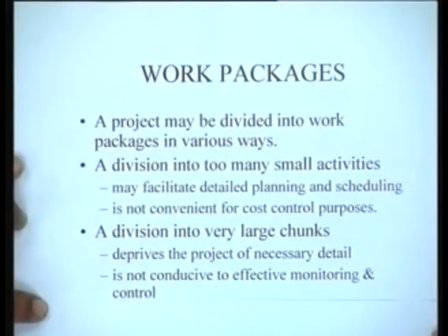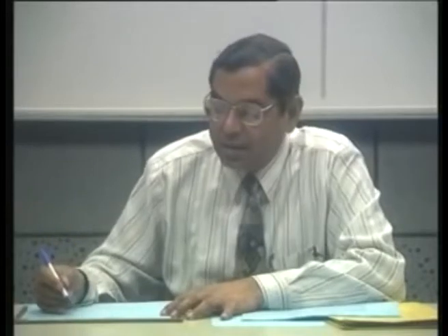The conclusion really is that if you have to do effective monitoring of a project, you should be able to divide the project into manageable work packages which are neither too big nor too small. And in fact, that is the key notion in PERT cost. What should be the characteristic of the recommended work package? A work package is nothing but a chunk of the project, or a collection of activities in the overall network. The recommended work package should be neither too small nor too big. It should be manageable. That is what we have seen, because if it is too small, then it is useless. If it is too big, then also it is useless.